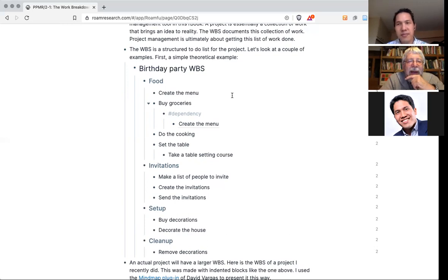And now I had a question, but you answered the question meanwhile. I was wondering if each branch must have the same depth, if you need to detail everything to the same level, or you just drill down to the level of the work package. So work packages don't need to be all at the same level. No need. It's really up to you.